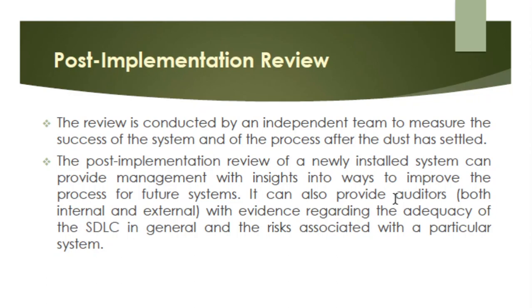Next is post-implementation review. The review is conducted by an independent team to measure the success of the system and of the process after the dust has settled. The post-implementation review of a newly installed system can provide management with insights into ways to improve the process for future systems. It can also provide auditors, both internal and external, with evidence regarding the adequacy of the SDLC in general and the risks associated with a particular system.